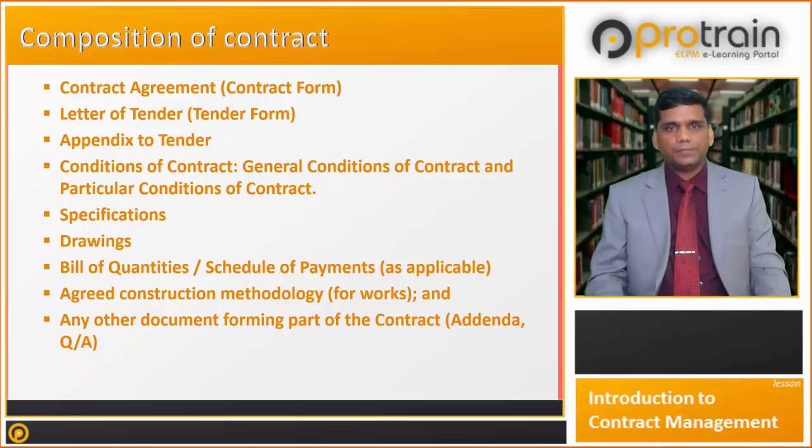Drawings. They should be adequately detailed in conjunction with the specifications, the bill of quantities, and the nature and scope of the works included in the contract. In most contracts, supplementary drawings will be issued as the works proceed. However, this should not delay the progress as planned.